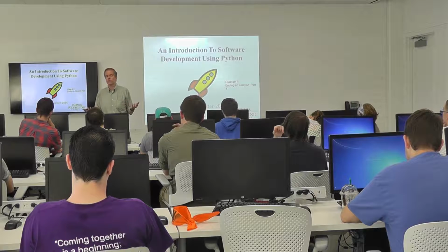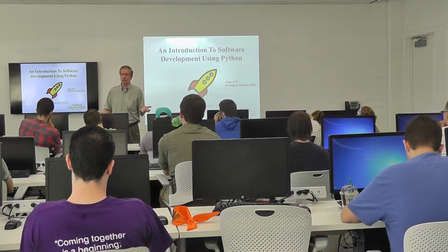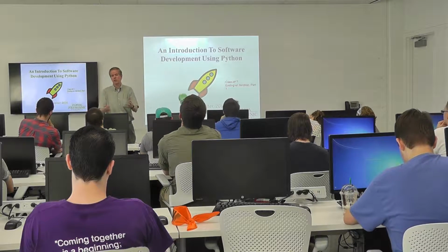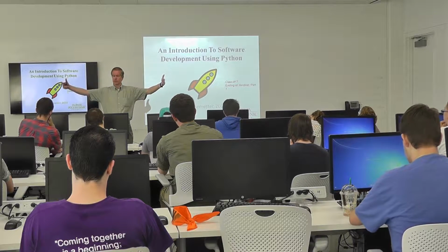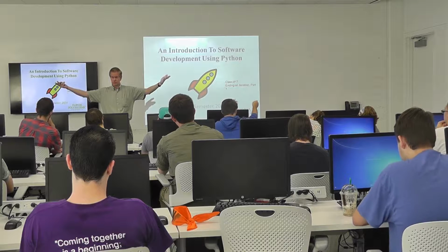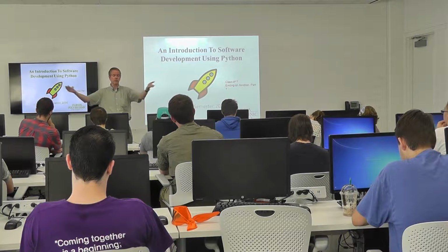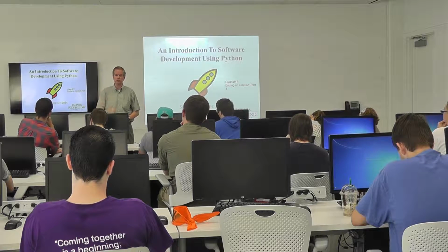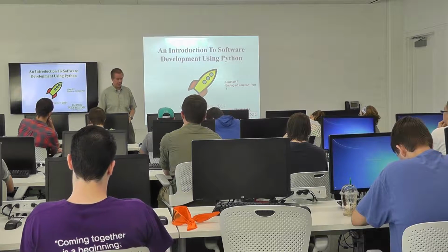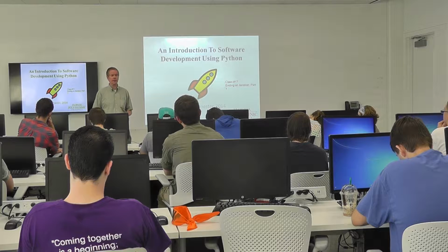We said, well, we've got to schedule this stuff. We've got to plan for actually implementing it. We can't just put it all on the table and say, do it. So we came up with the concept of an iteration, and our iterations are how long? About a month, which comes down to how many working days? About 20. Once again, this is all just a rule of thumb. So about 20 days. So we look at our 20 days.